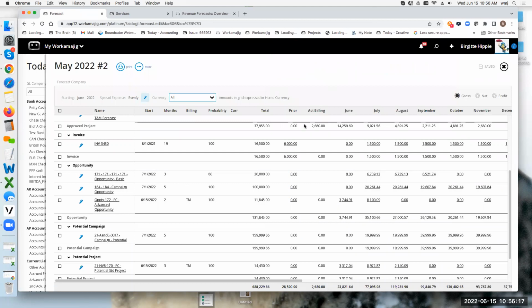Do the expenses on media get accounted for in a forecast provided we check include expenses? You would have to have a budget on a media project because really that's what it's forecasting. Again, it's not looking at actuals, it's looking at a budget. So if you have a budget for your expenses, then it can include that budget, but not if you're just looking at actuals.